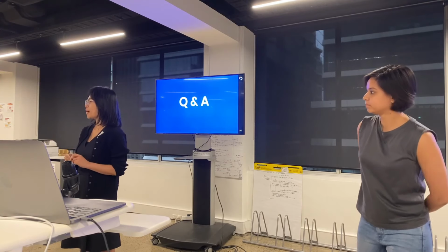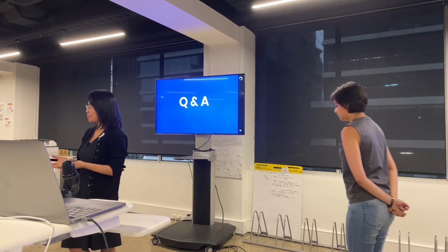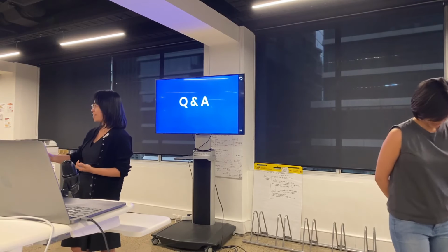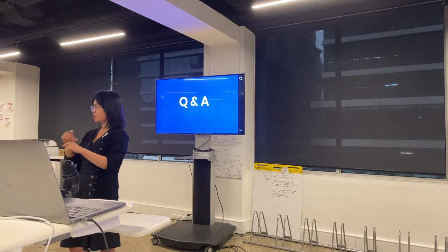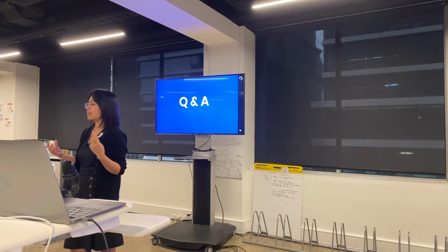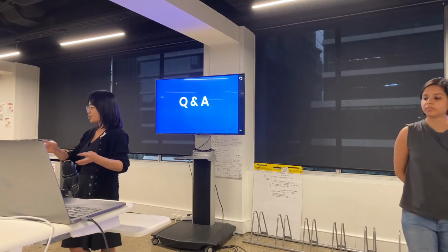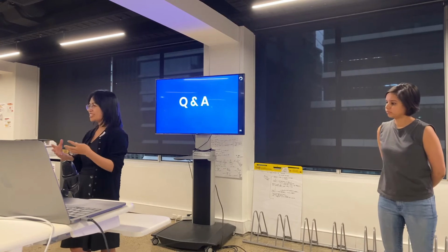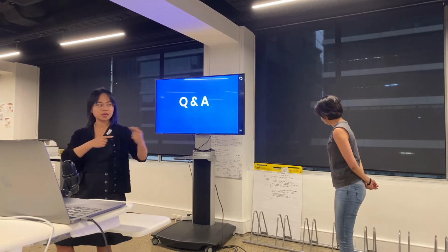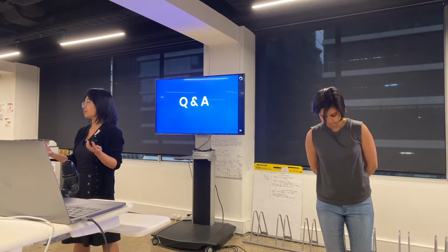Actually, that question reminds me of one project we worked on together. I had an assumption of a user story mapping first, and then we went to the client side to do the research, and then we got the feedback back to reorder that one and try to answer our assumptions, and then drill down into user stories and do a follow-up workshop with the clients to make it more like what the client really needs. So I think user research and our BA work and the user story map collaborate with each other, and it's not defined, it's not set in stone.